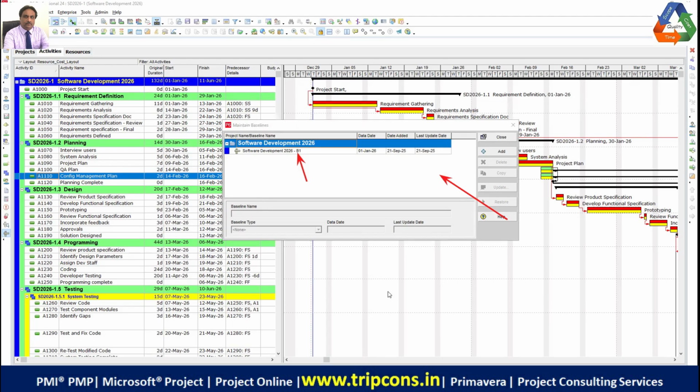How, why the client can change the baseline? Client says, look, I want to change the product details. So then you will have to redesign the product. You have to recalculate the new activities. Then you will re-baseline the project. So you'll have a new value of duration, cost, resource units. And then you will tell the client, look, this is the impact of the change that you demanded. He says, okay, go ahead, done. So then you will create B2, right?